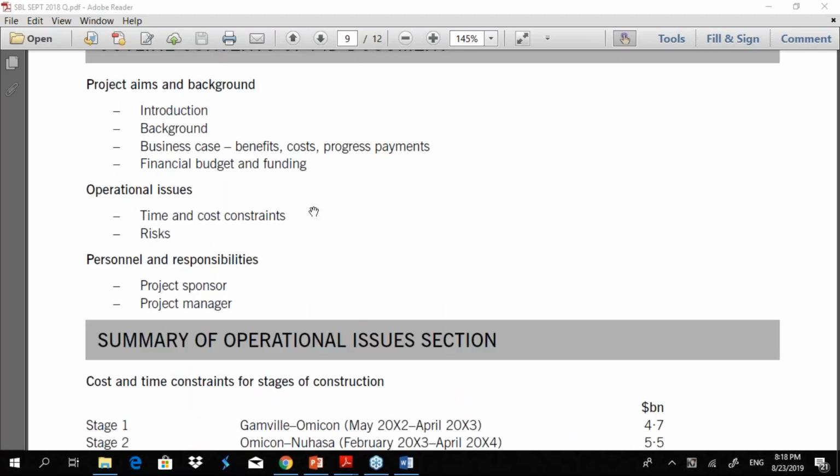Also, you must bring in project monitoring and quality. That is, it's something like a review section, variance analysis. When do you review? What do you review? Who reviews it? What are the accepted KPIs between the company and the government, and are they satisfied with those, and so on.